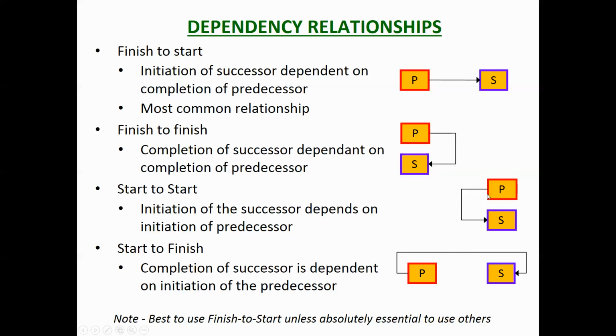Start to start, the successor cannot start before the predecessor starts. And start to finish, the successor cannot finish before the predecessor starts. And so there are situations where those sort of relationships would be suitable, but at our level, let's just work with the finish to start, because these ones put all sorts of complications in.